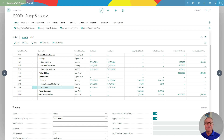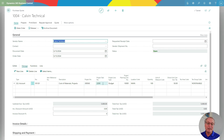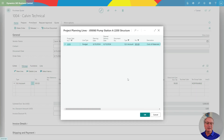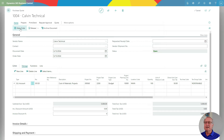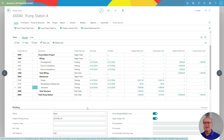Let's see how I use the purchase order to bring in an additional cost related to a subcontract for this particular project. I put this purchase quote together when I was planning the project and presenting it to my customer. My customer wants to go ahead with it, so I'm going to turn this into an order and then receive it. This purchase quote is already assigned to the project, to the task within the project, and also a specific line item in the detail. I'm going to go ahead and make an order of this, then receive it and invoice it. This cost will then go into the project — and I'm done with the cost on this project.